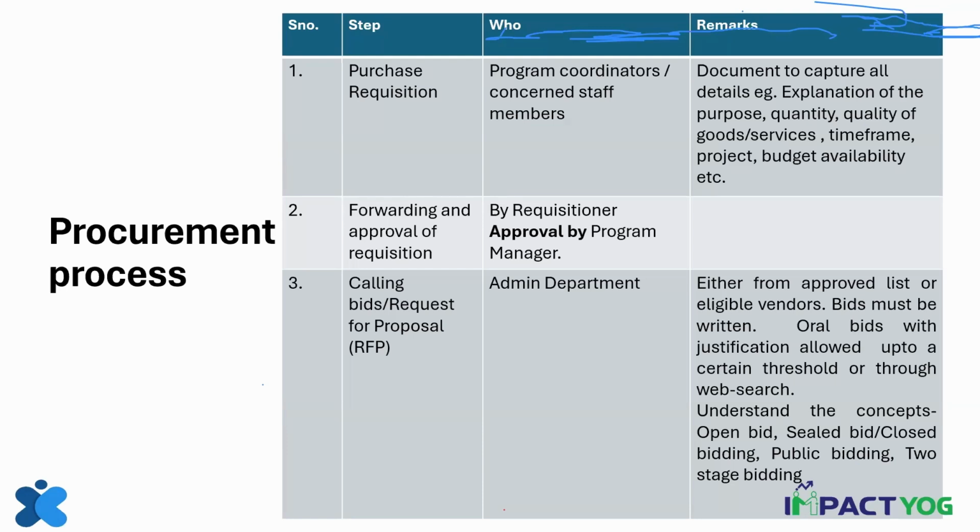Procurement without quotation is a method. In that case, what will happen? You're not asking for quotation, but you are asking that person by making a call, what is it that you will ask require for this product. Now that is for very small kind of products. So then you will not follow the entire procurement process in terms of bidding, because that will make cost, if you have to have efficient procurement.